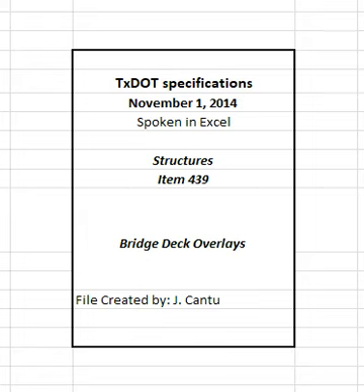Obtain approval to open any course to traffic. Obtain approval of cleaning and surface preparation methods for initial courses that were open to traffic before the final course was applied. Do not allow construction traffic on the final course until it has cured sufficiently to prevent damage by wheel loads. Minimum curing periods will be in accordance with the submitted curing time chart.